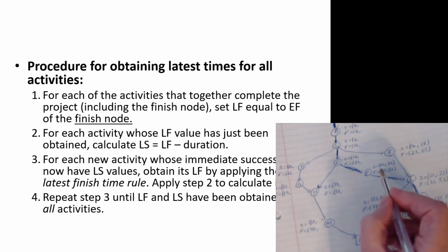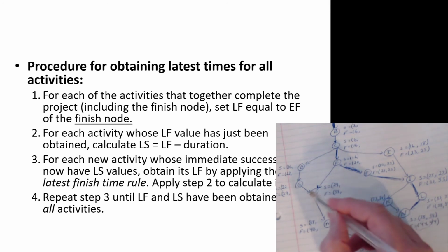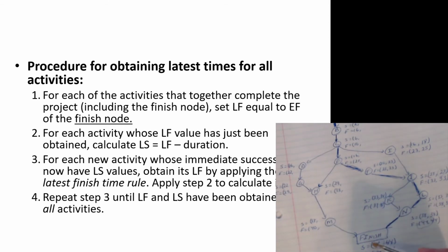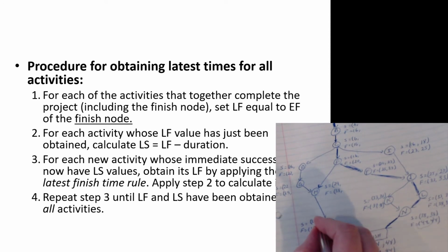Working now into E. E requires a little bit of knowledge of H, so let's drift back to the finish and go to M. The project finishes at week 44, so that means M must be done by week 44. Subtract off the 2 weeks that M takes, and it must start no later than week 42. There is a slide that has this all stated, the final answer, in nice, neat, typed format. So don't sweat. We want to keep the concept rolling here.